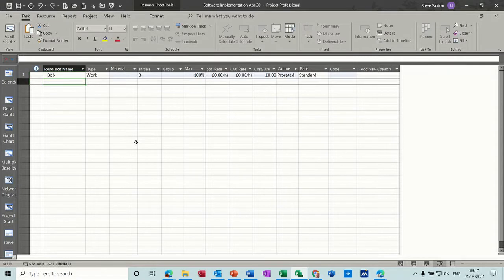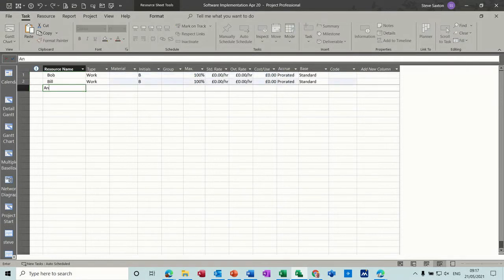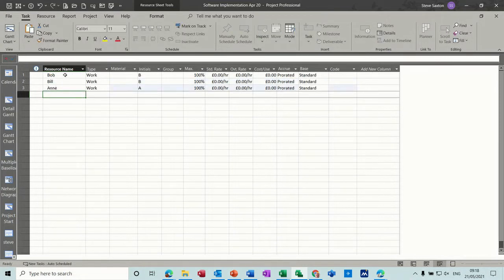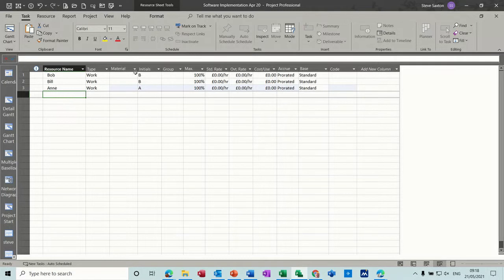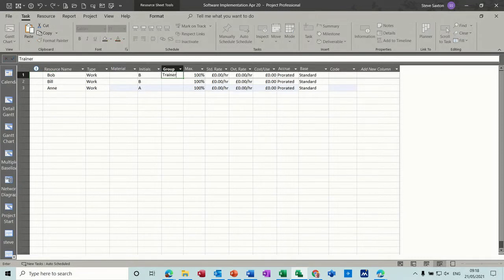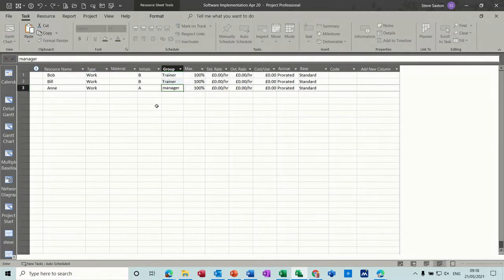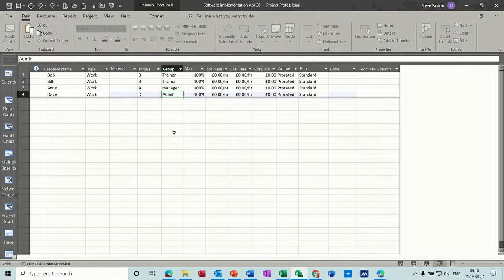Simply type in the name of the resource or the appointment — it's totally up to you. You get more information if you use people's names because then you can have a personal calendar. If you use the appointment, that could be anybody and you might have 10 people as an engineer, for example, but you get less facilities for that resource. Over on the right you have the group column — so you could put 'engineer' or 'trainer' there, and then you can run reports and filter on this at a later date. I'll add a couple more people including an admin support resource.